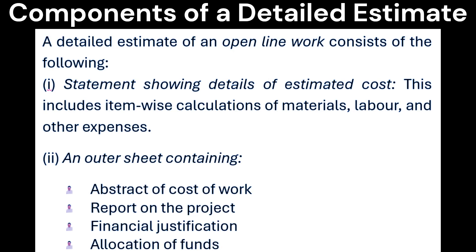Components of detailed estimates: A detailed estimate of an open line work consists of the following. First, a statement showing details of estimated cost. This includes item-wise calculations of materials, labor, and other expenses.